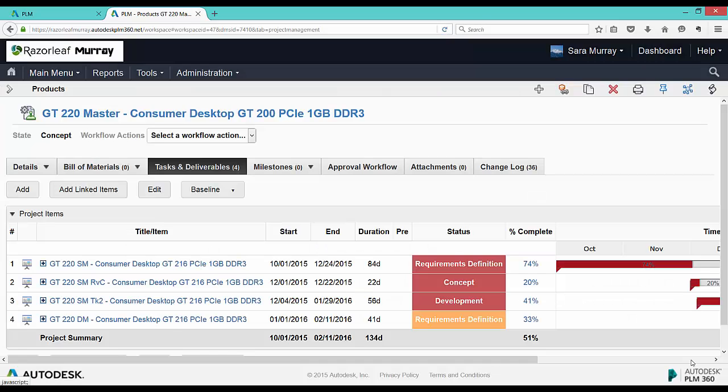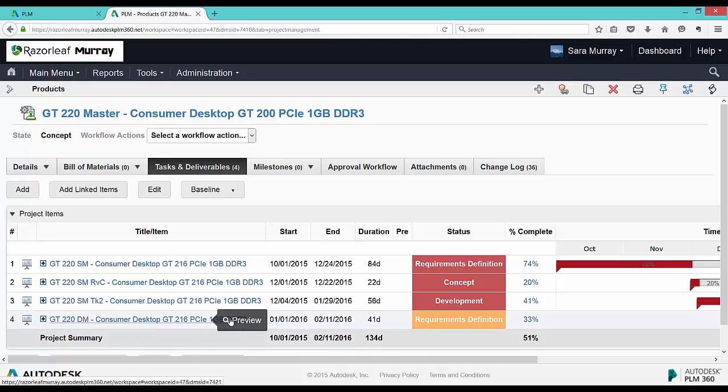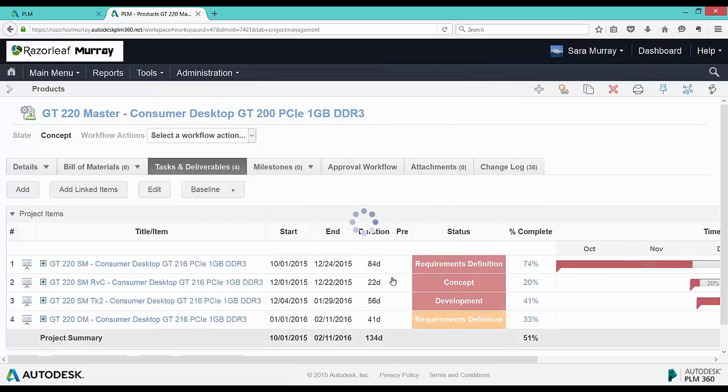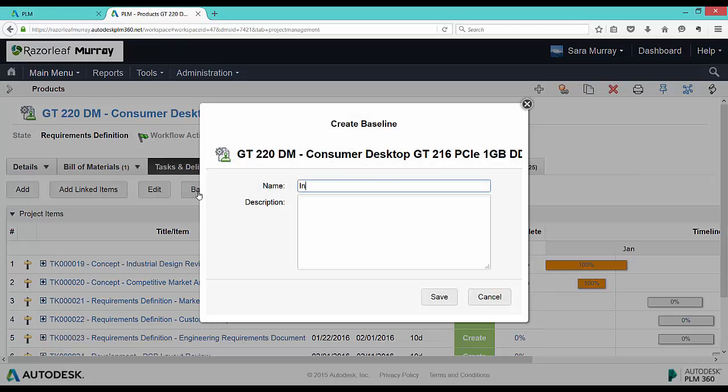Another nice feature of project management in Autodesk PLM 360 is the ability to create one or more baselines. Then, when the project dates change, compare the baseline with the actual. Back on our example of the product with the project management tab, we'll create a baseline called Initial Plan.